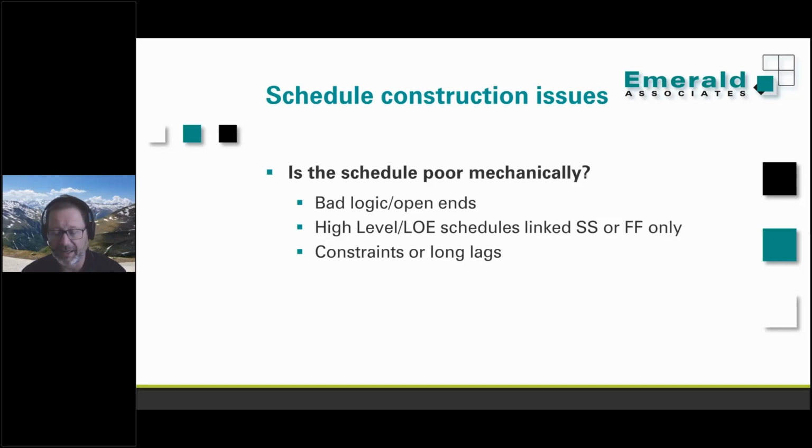I had a client call me just last week. They have a 3-year project. They did the risk analysis on the schedule, and they came up with a difference between the deterministic finish date and the P80 date of 3 weeks.